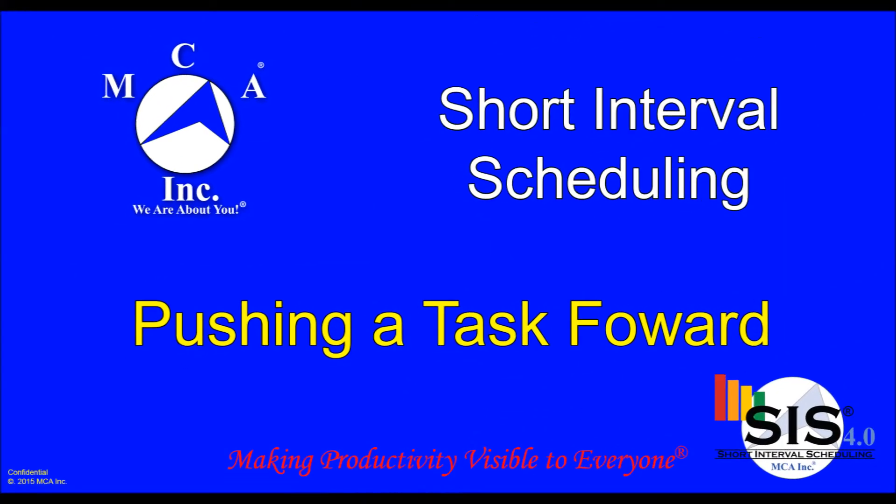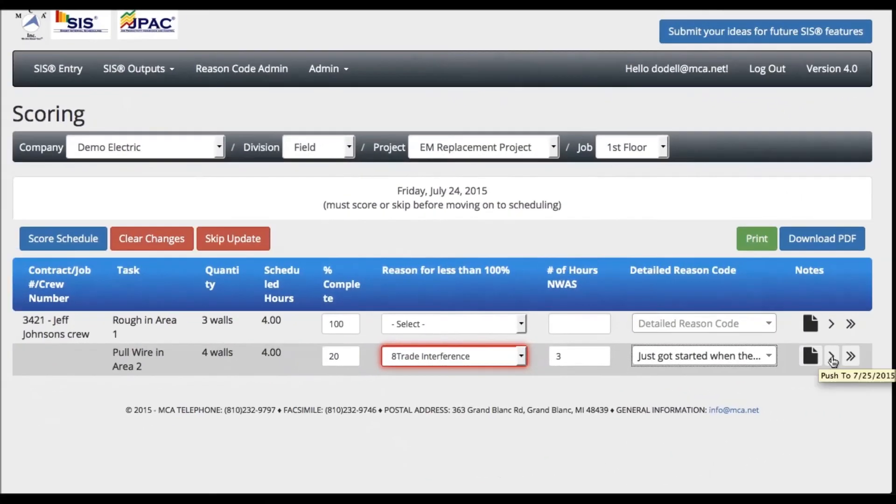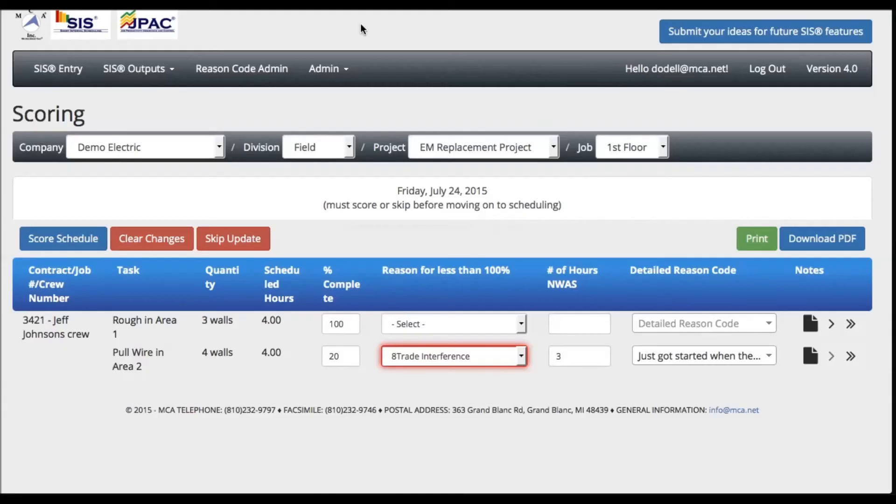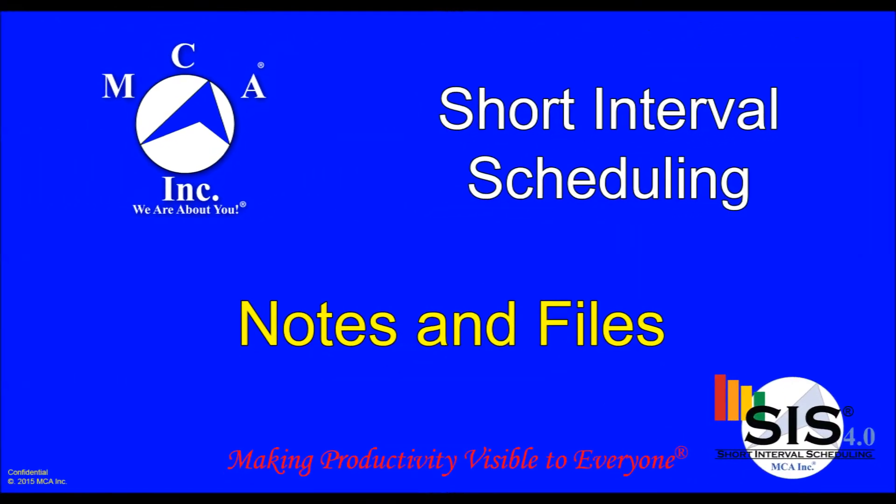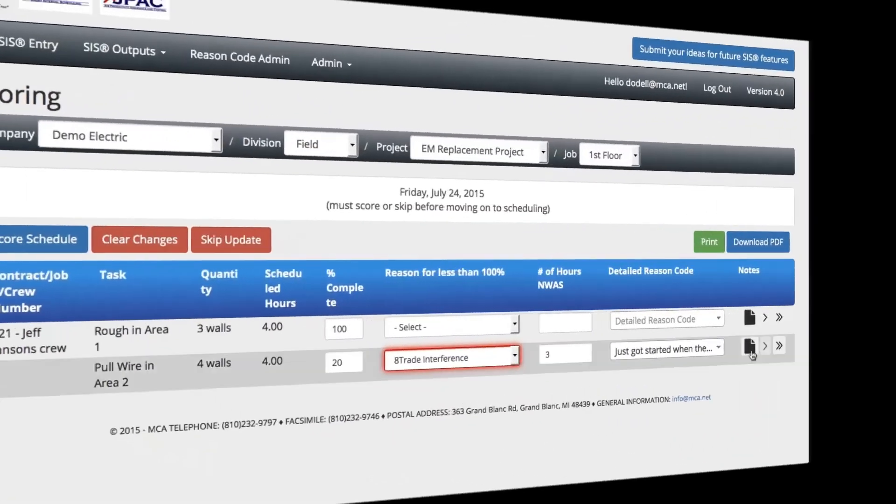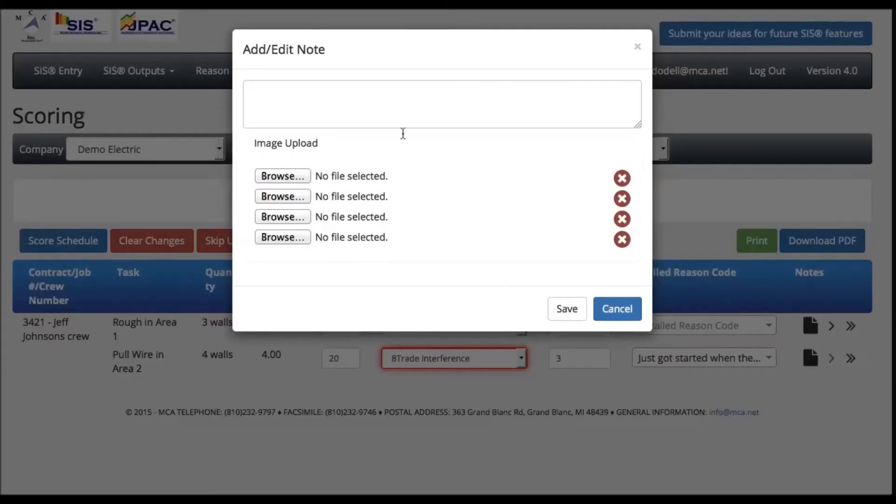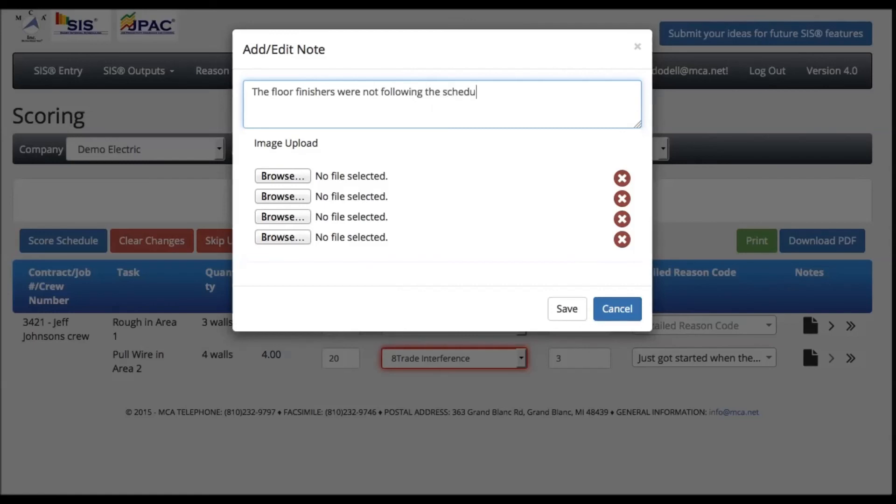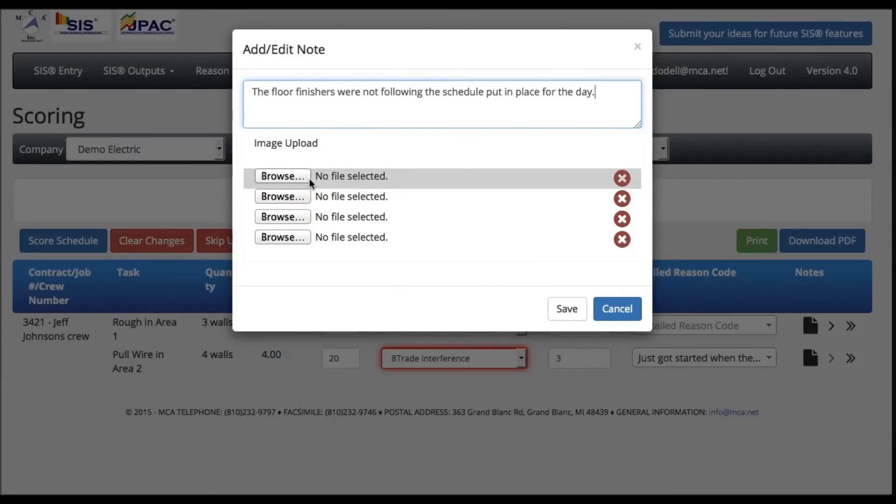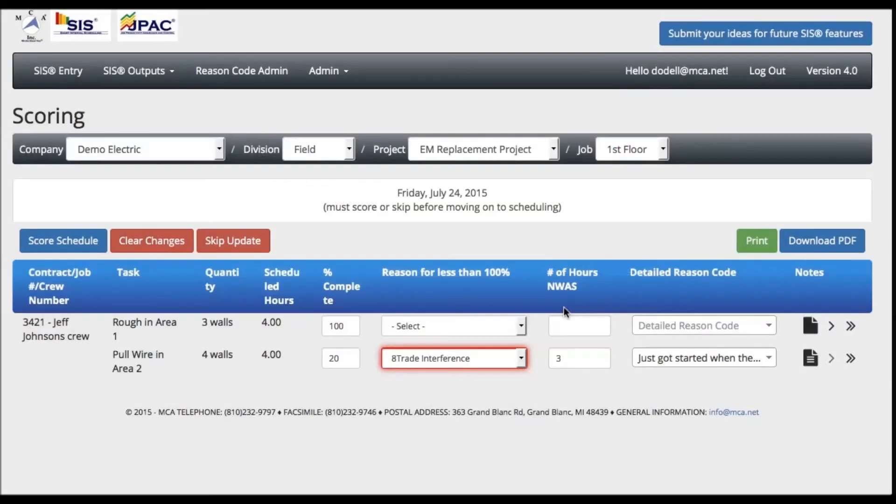If a task was not completed, you have the option to push the task forward up to two days. Users have the option of entering additional notes for each task to further describe the obstacle, or the current status of the task. Users also have the option to upload up to four images for each task. When completed, select the Save in the lower right corner.